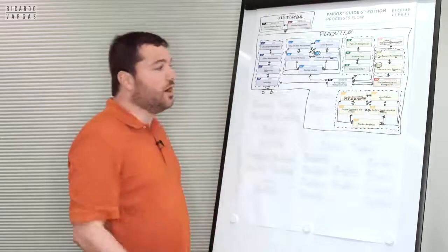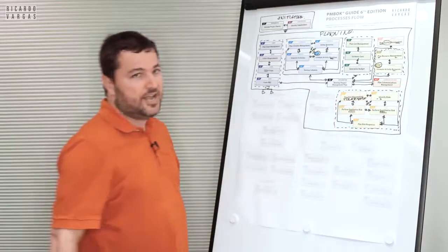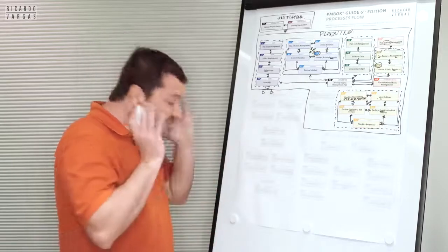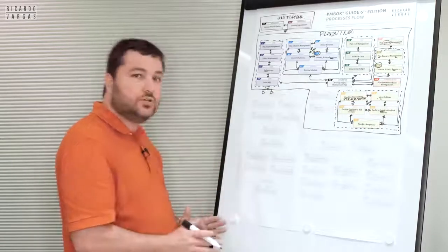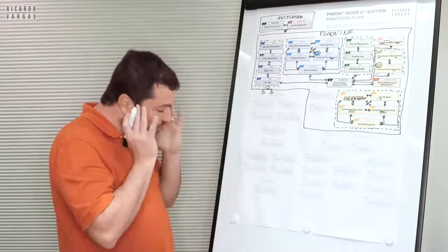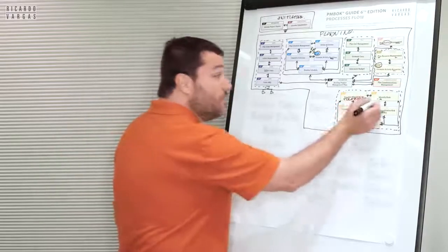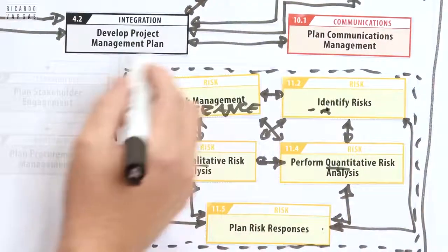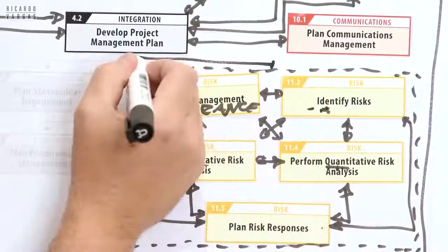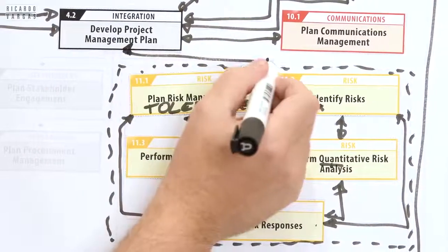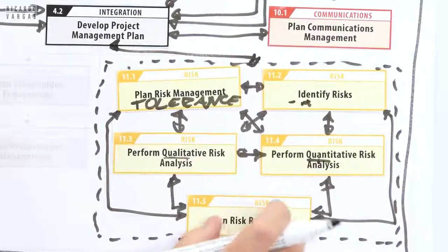And you cannot say, oh, the risk is done, I cannot go back. This is not good. If you do that, you will be wrong, completely wrong. Then you go back here. Maybe you don't go only back here. You go to the plan to understand the integrated impact of your response.